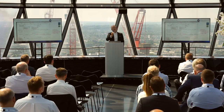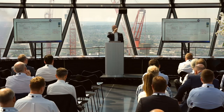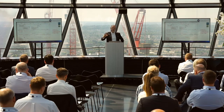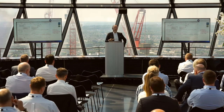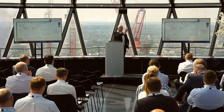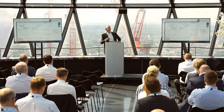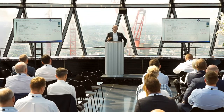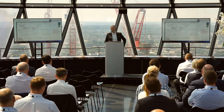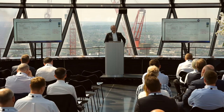A design phase program can just be something as simple as a network, an overall network. We do this then, this is the milestones, this has to happen before that, because you can get people to agree to that, because it's what I call a dimensionless program. It doesn't have dates, it doesn't have time, it doesn't have money, it has process. This happens here, this happens here, this happens here. And again, it's a signal to the bidding teams of what has to happen, and sometimes it helps communicate the complexity of what has to happen. And you get a lot of information on one page if you do it right.